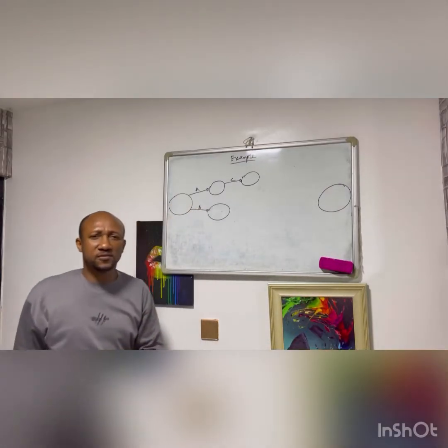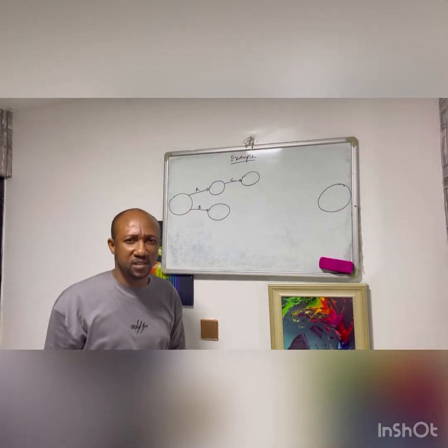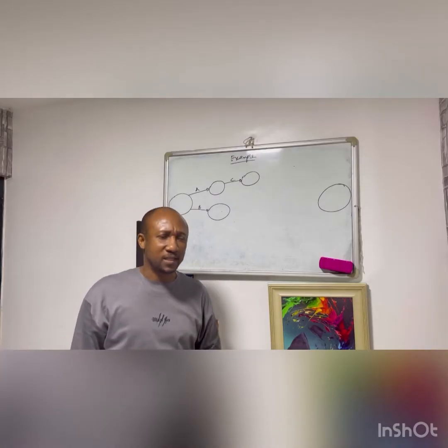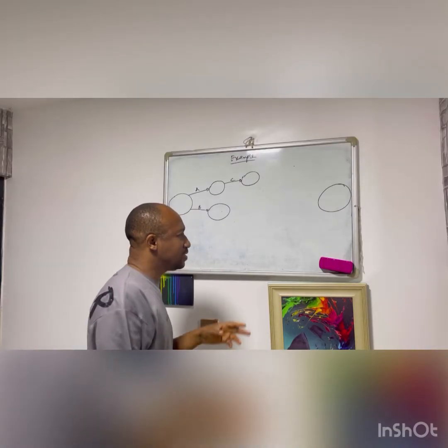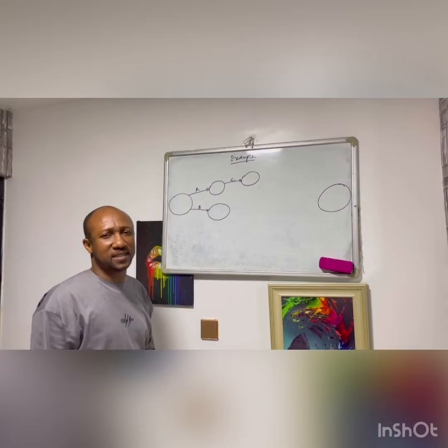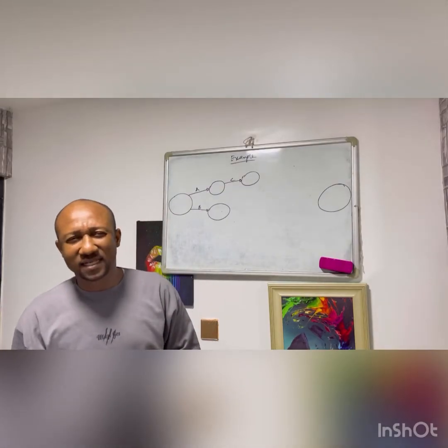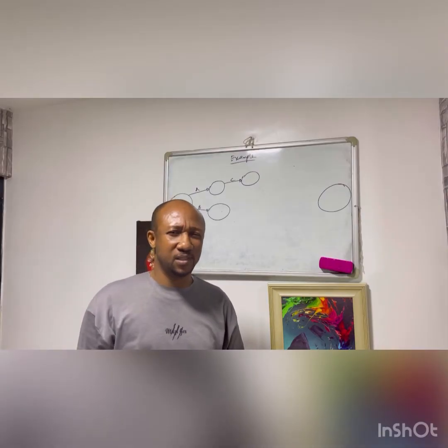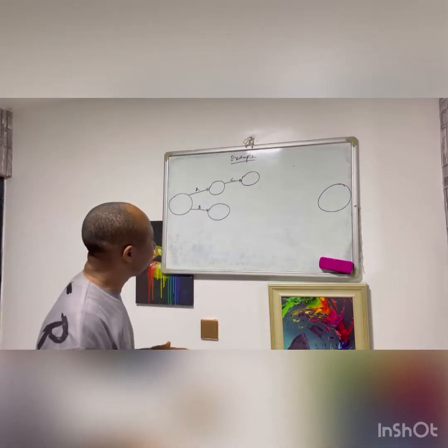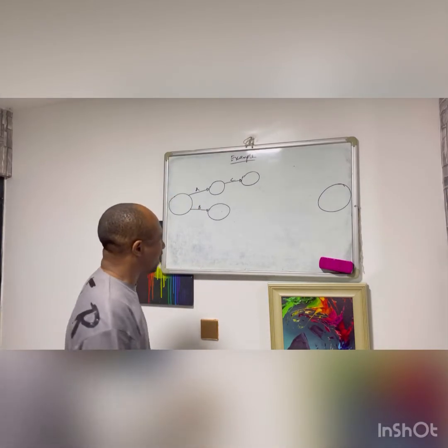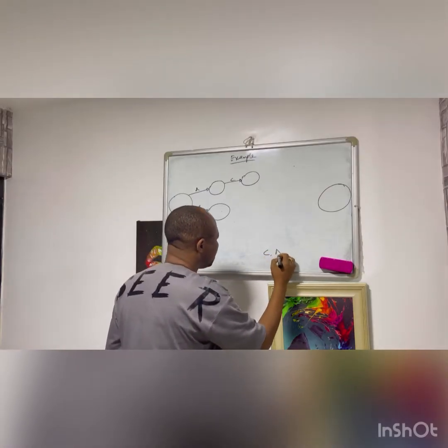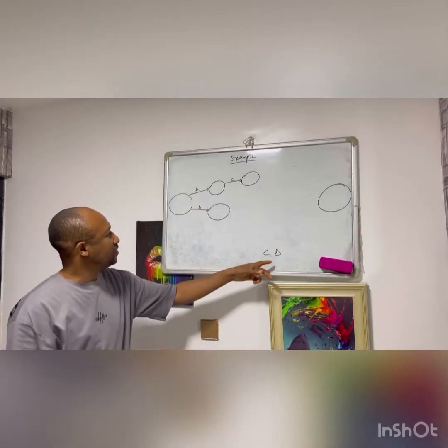The next activity for me to draw is activity D. Then the question is, where will activity D start from? Activity D has activity B as its preceding activity. If I still look in that column, I still see activity C and D together, meaning that they end together.